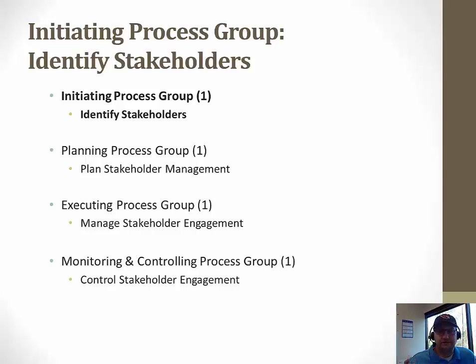Stakeholder identification is also an important part of the process of developing the requirements. Missing stakeholders, in other words, leads to missing requirements because you don't have everybody at the table. The consequences of missing requirements we all understand at this point, and it's often cited in the literature.